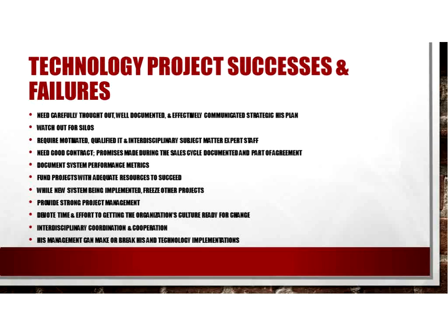An example of a key milestone type payment schedule approach, you may include contract signing, they get 10%, hardware installation, software installation, 10%, project plan development and staff training and orientation to the new system, 10%, systems design and build, including modules, applications, and reports that constitute the total system as outlined in the RFP and requirements definition, 15%, and so forth.